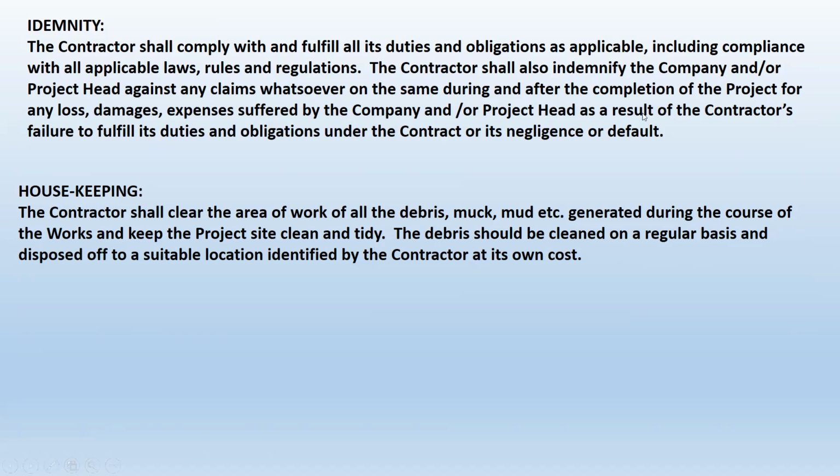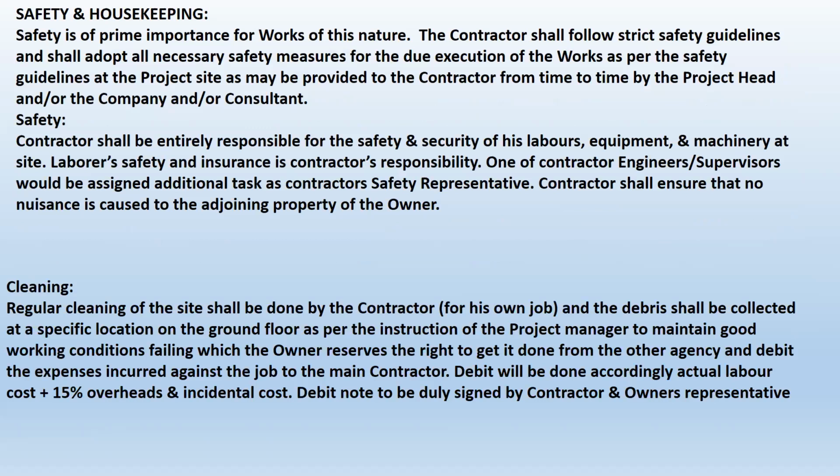Housekeeping. This is the most neglected part of the contract by the contractor, which causes a lot of damages and a lot of unwanted things at the site. So I have to make it very clear that the contractor has to do the housekeeping on a daily basis. The client will visit on a fortnightly basis. If it is not up to the standard, the client has every right to penalize or get it cleaned and charge him according to the condition.